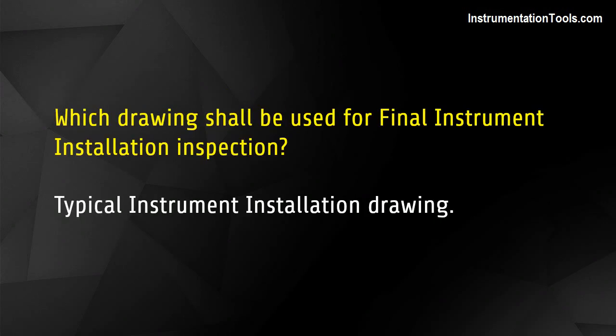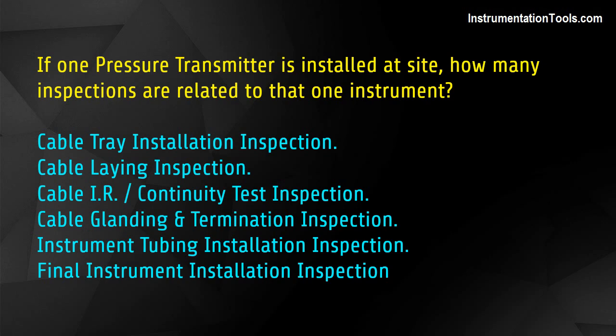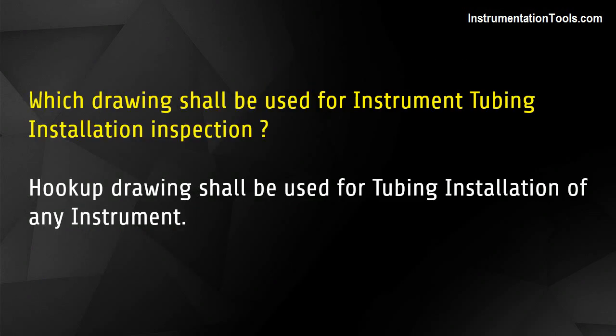Which drawing shall be used for final instrument installation inspection? Typical instrument installation drawing. If one pressure transmitter is installed at site, how many inspections are related to that one instrument? Cable tray installation inspection, cable laying inspection, cable IR continuity test inspection, cable glanding and termination inspection, instrument tubing installation inspection, and final instrument installation inspection. For instrument tubing installation inspection, the hookup drawing shall be used.